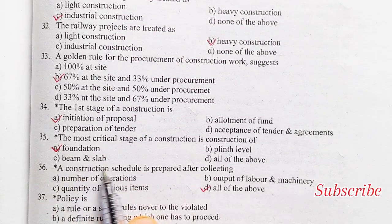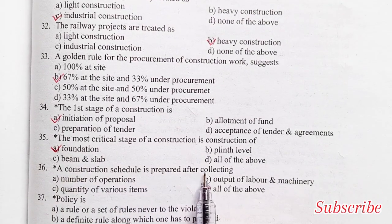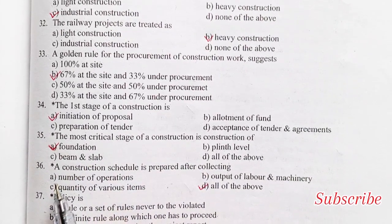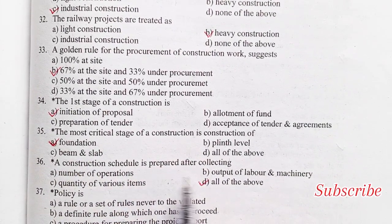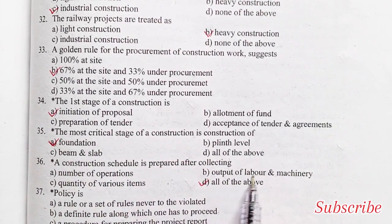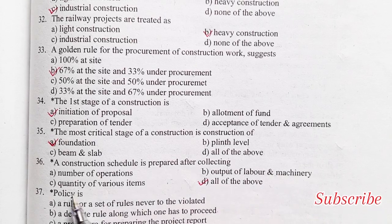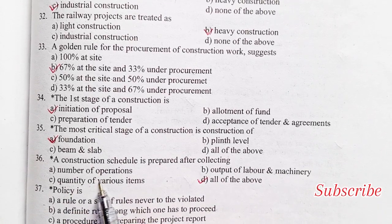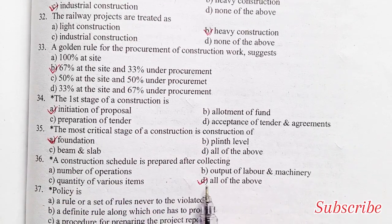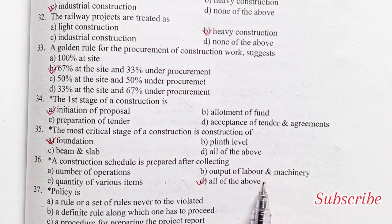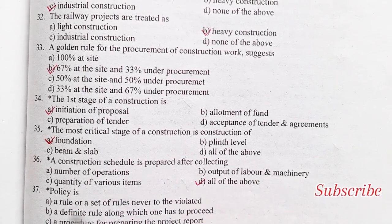Construction schedule is prepared after collecting: number of operations, output of labour and machinery, quantity of various items, all of the above. The right answer is option D — all of the above.